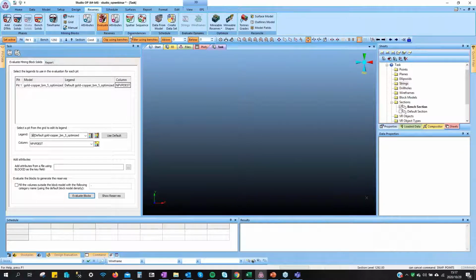Here under dependencies, it is very important to use the spatial dependencies. Basically, we do not want to mine a block underneath another. I do not want the undermining, so this is why I'm going to create vertical dependencies that will help me and also guide me through the schedule.